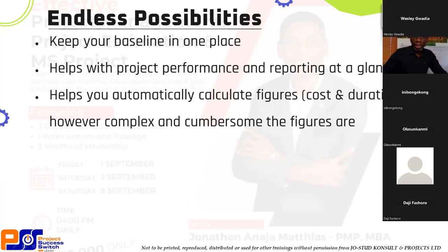Now, sometimes, Mr. Wesley, I'm using your name today because your case is the case study. So don't mind me. So Mr. Wesley can actually cast first floor slab, and because it's required that it needs 28 days for it to cure, there are some activities that should happen after first floor slab. For example, striking off of formwork. Usually, after you cast a slab, you strike off formwork.